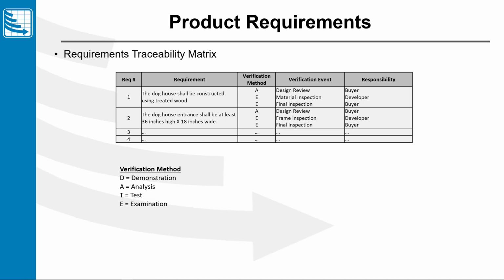If it's the developer, then they're going to produce some kind of report back to me that says they did this, and they're going to certify that they did it. If it's myself, well, then I'm going to have some kind of form that I write and generate that shows that I actually did this, just for that traceability, and later on if we need to go back and audit whether or not the work was done properly. So a very simple, high-level requirements traceability matrix. They can get very complicated though.